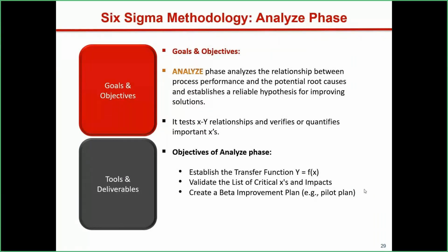Obviously, if you identify a plan, say you have identified that in preparing tea, I require 5 inputs. I'll name them A, B, C, D, E. Now, after doing the define phase and measure phase, in analyze phase, you identify that only A, B, and C or A, B, and D are more critical or more impactful to the output, that is the actual tea.